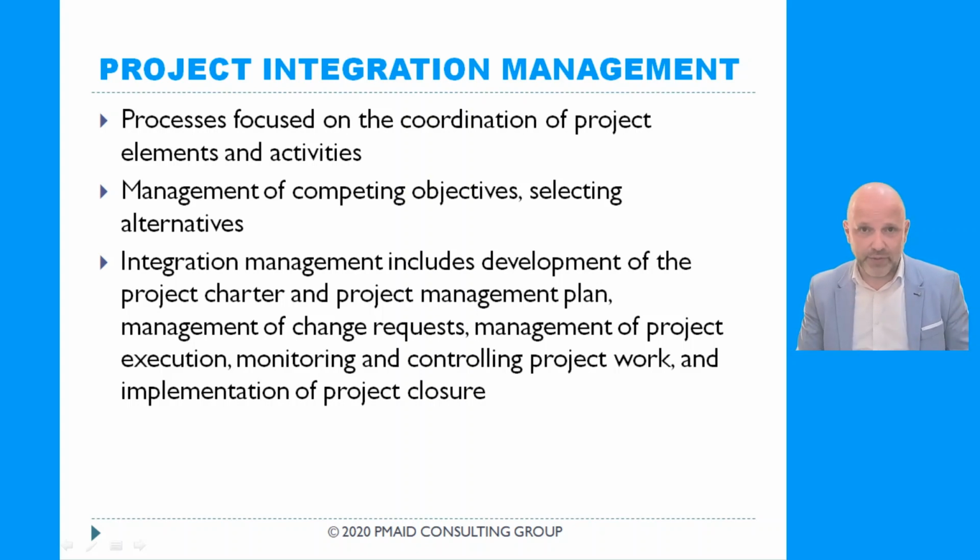disengaging processes. So project integration management includes processes focused on the coordination of project elements and activities, management of competing objectives, selecting alternatives. Integration management includes development of the project charter and project management plan, management of change requests, management of project execution, monitoring and controlling process work, and implementation of project closure. So pretty much everything, as long as we can engage processes from other knowledge areas.